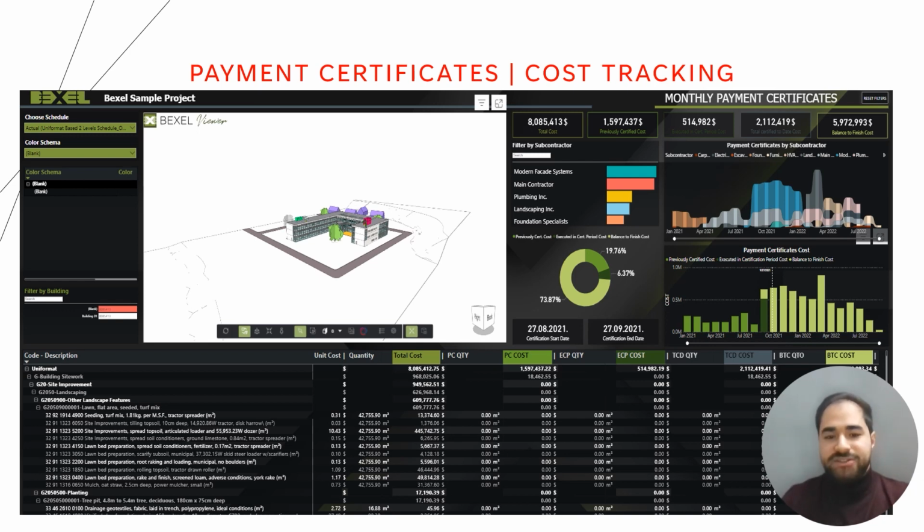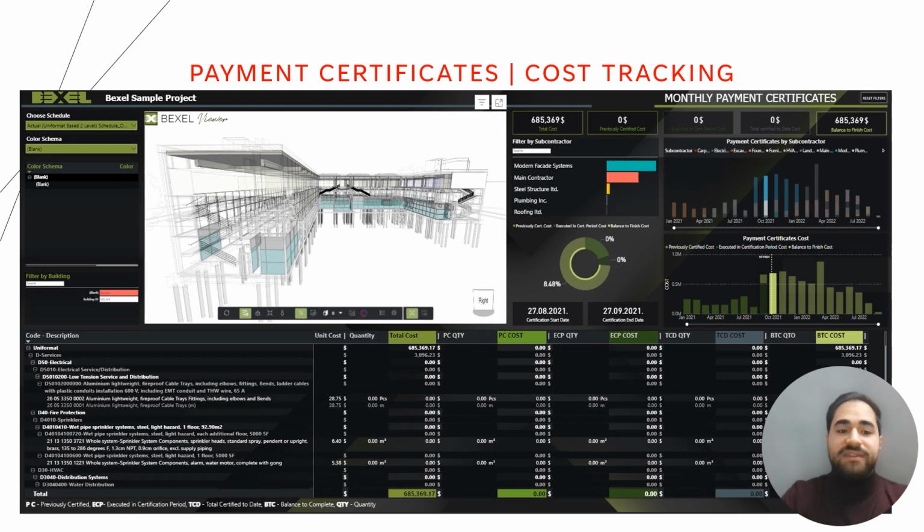What is the extra here? The extra here is, if we click on a month, for example October 2021, we will see that the Revit model, or the 3D model, highlights the items that will be constructed in this month specifically, and also who the subcontractors are that will be assigned to this project, and the cost breakdown for these items. All of this will be visually inspected in a dashboard, which we can call a live project. So here we can check any item, we can do whatever we want visually without Excel sheets and all this dated part.